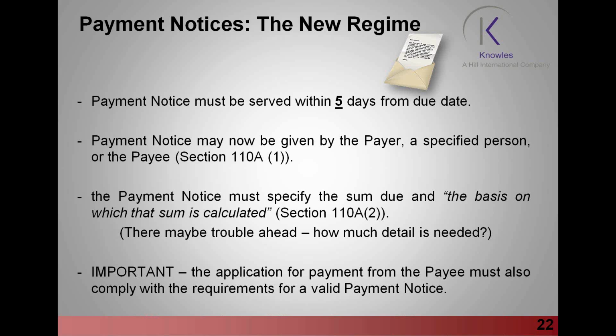Importantly, the application for payment from the payee may actually be the payment notice, and we'll look at that in a minute. But even the application for payment, if it's to be of significance and of standing, that must comply with the requirements for the valid payment notice in terms of detail. Let's look at this graphically.